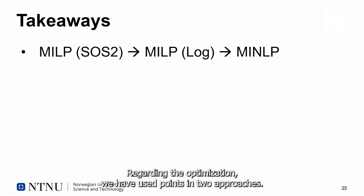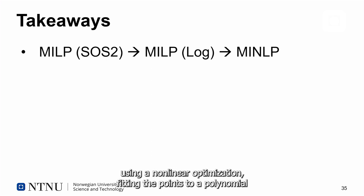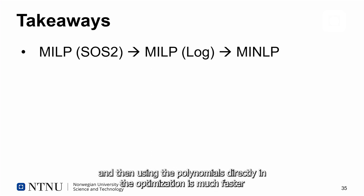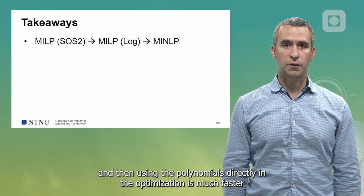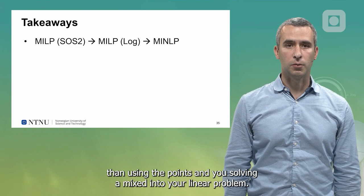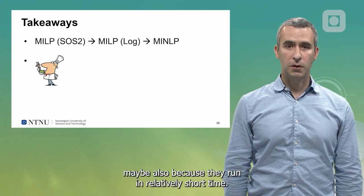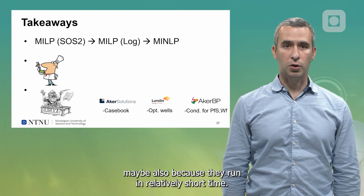Regarding the optimization, we have used points in two approaches, using SOS2 variables and the log formulation. But we found actually what runs faster is non-linear, using a non-linear optimization, fitting the points to a polynomial, and then using the polynomials directly in the optimization. It's much faster than using the points and solving a mixed integer linear problem. Sampling worked fine for our models, maybe also because they run in relatively short time.